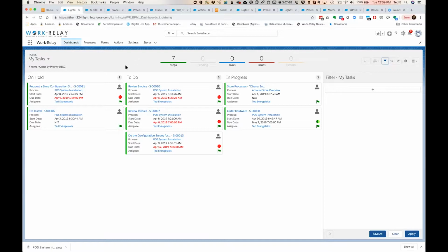We've added a couple of features on the Kanban itself, like a risk indicator, which will look at the timeline that's been provided for the project or the process, and what the timeline for a particular step in the process looks like. It'll evaluate if you're late on the step, or if you're going to be late on the process, and give you a split rating like you see here on this view.